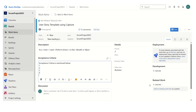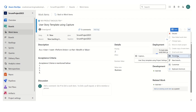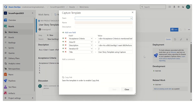All we have to do is click on the three dots and under templates, click on capture. When we did the capture, all it did was capture the necessary fields — it has captured the acceptance criteria, area ID, description, iteration, and the title.